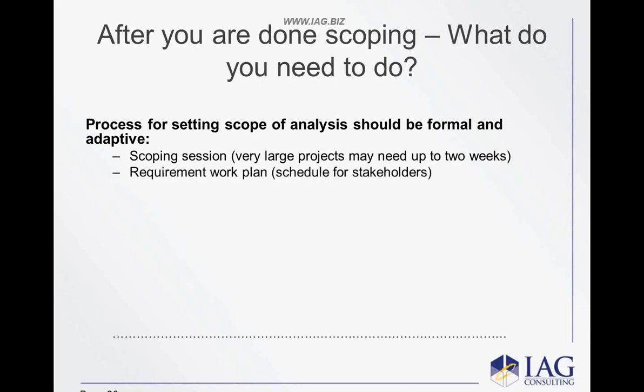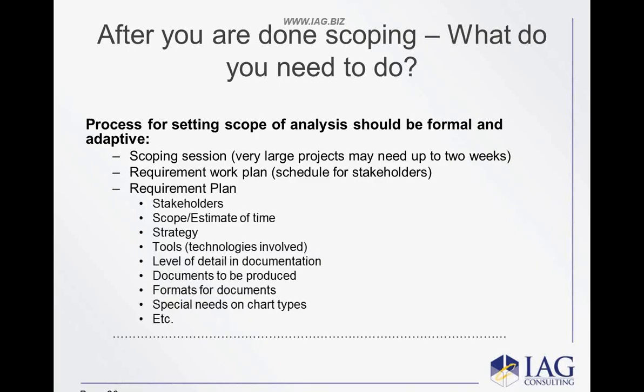The next thing is you need to create the requirements work plan. I can't remember which one of you, a couple of you mentioned, hey, this is the main outcome that we need to accomplish. But you do need to size the work for your stakeholders. If I am going to go forward with the requirements, I am now asking you as the business to commit a certain amount of resource to me as the analyst to interact with together to go get the requirements figured out. If I don't tell you how much it is and how many hours and what format and the days and all that sort of stuff, you're not going to commit the resources, or you're not going to fully commit them, or you're going to think something's different than what I'm thinking, and it's not going to work all that well. The last thing is you need a requirements plan of some kind.